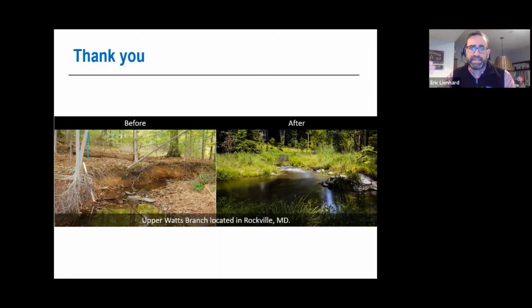The only thing that was kept in this project with DC Water was expanding that one catch basin, which is just, from our calculations, undersized for the build out in that area. So we're going to be putting a triplex catch basin there. If you're very familiar with this, between the electrical pole and the park entrance will be a triple catch basin. But those other elements had been taken care of prior to this project initiating final design.